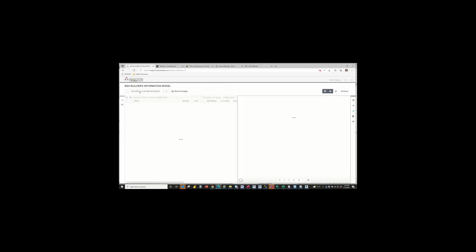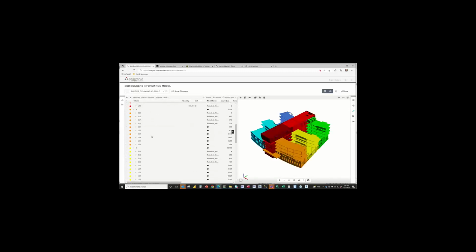So I'm loading up a model that has attribution on it that presents it as per my plan of tackling this configuration here. One thing that was interesting in this is that the floor slabs on the first 3 floors were all one slab around the entire building with a couple holes punched in it. But that's not how I'm going to build those slabs.